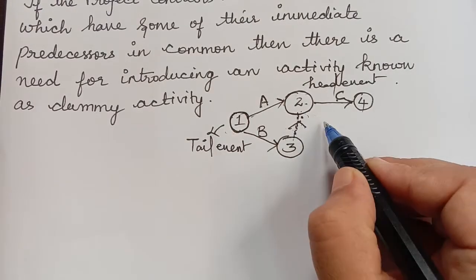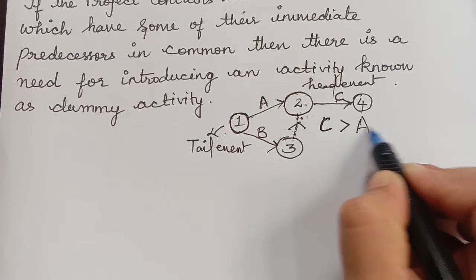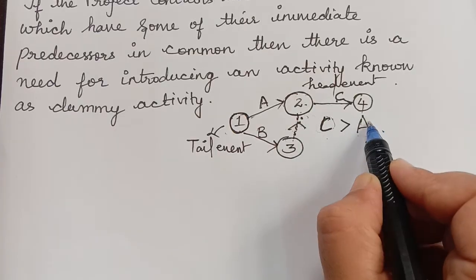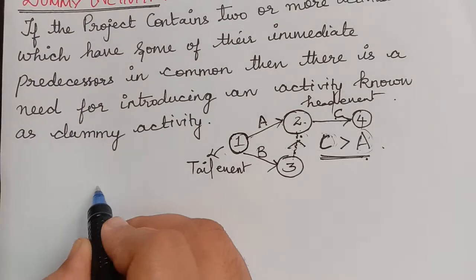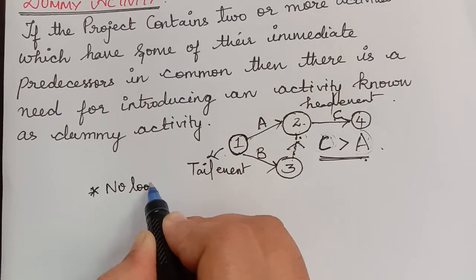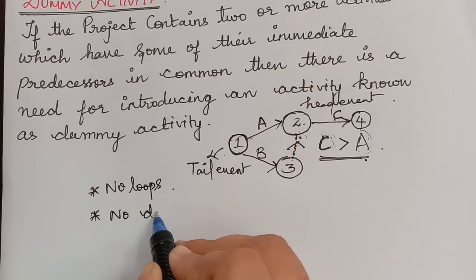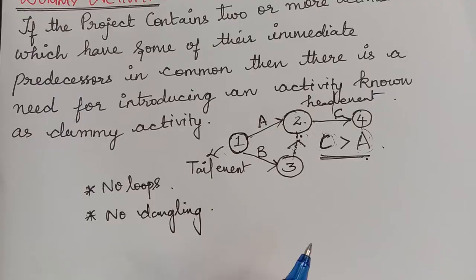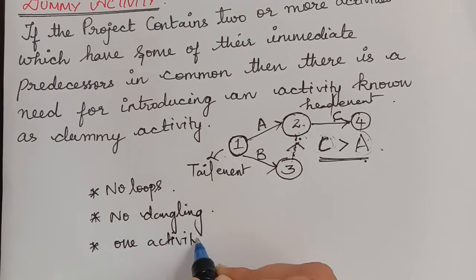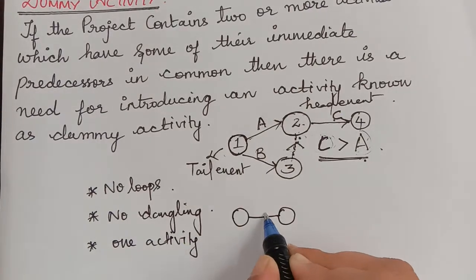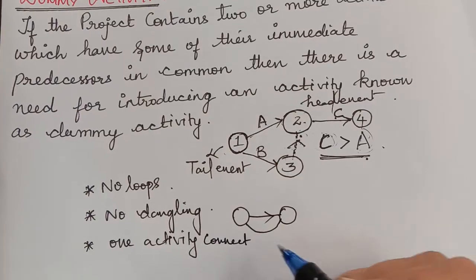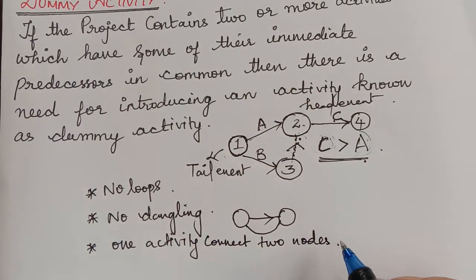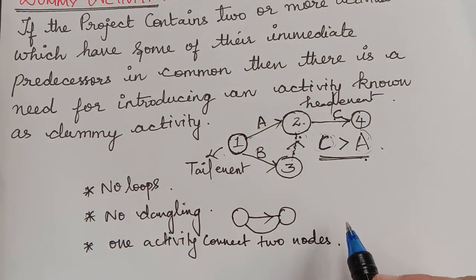We may sometimes write C > A, which implies that C is the successor of A and A is the predecessor of C. There are also certain rules for constructing a network: the network should not have loops, there should be no dangling, and only one activity should connect any two nodes — we cannot have two activities connecting the same pair of nodes. In our next video, we will learn how to draw the network and calculate the critical path. Thank you.